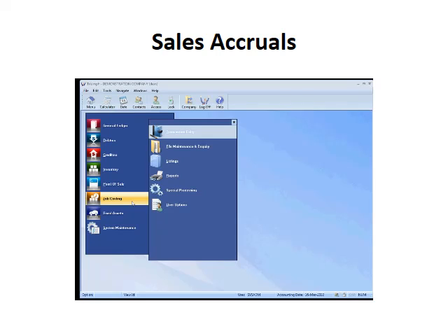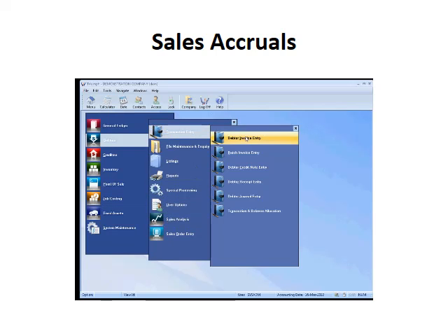So most times when people process transactions in job costing against income, they go through the normal debtors invoicing area and process them as a debtors invoice or a batch invoice. But occasionally you'll get a situation where you haven't yet got to finishing the debtors invoice or producing it for the customer, but you wish to record that you've earned income on a job, and really you're accruing the income.